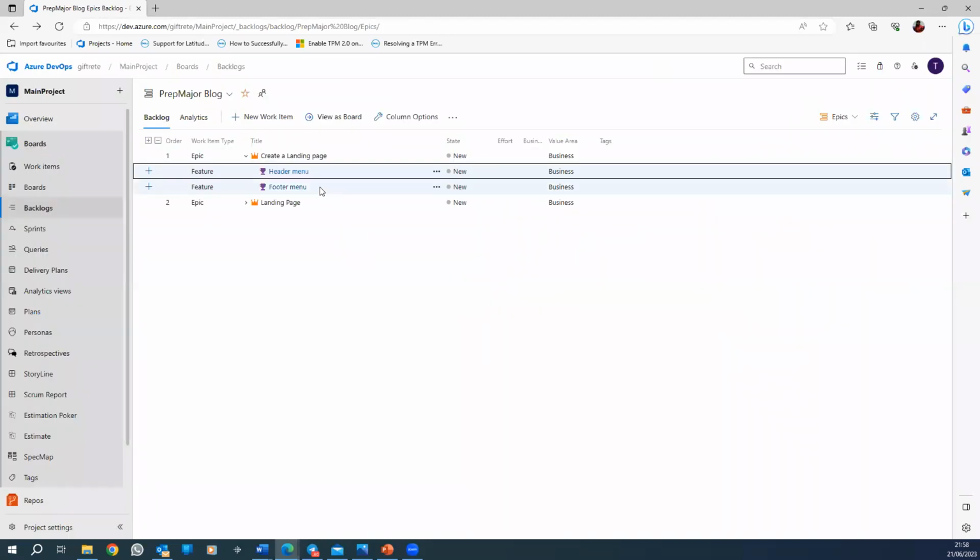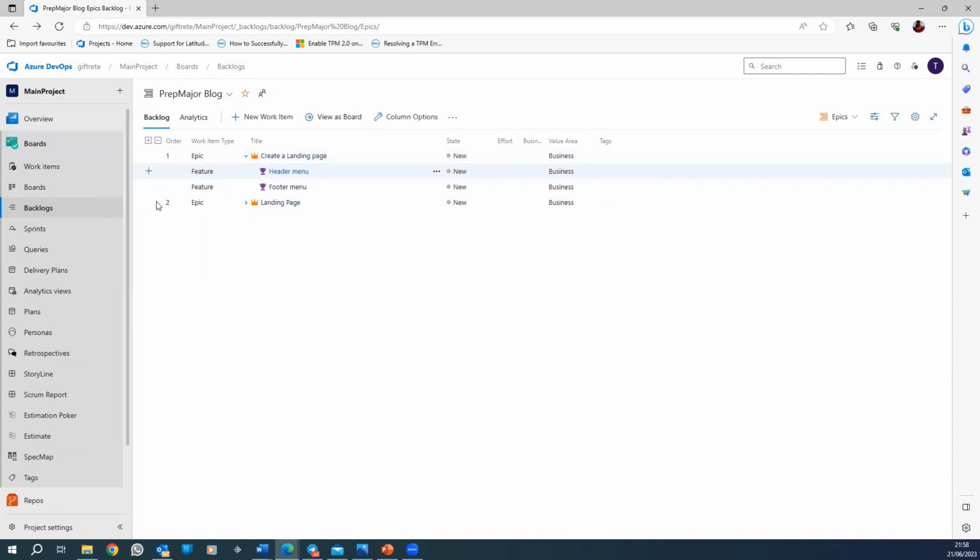Okay. Now, going to the main thing, right? If you want to create the user story now, the product backlog item, where will you put your cursor? Would it be epic or feature? Feature, yeah? Because that's where, when you hover on it, it says add product backlog item. Click on that. When you click on it, you have two options because you can create a bug, but it's the testers that will usually do that. So you're going to click on product